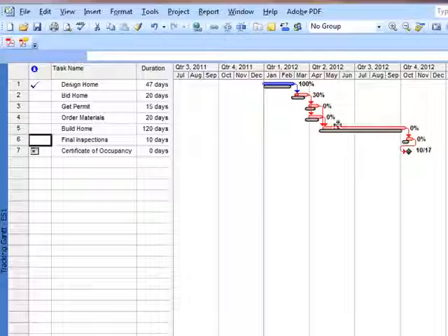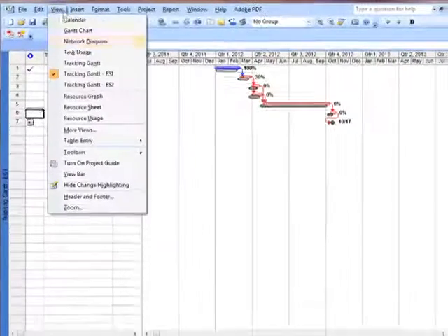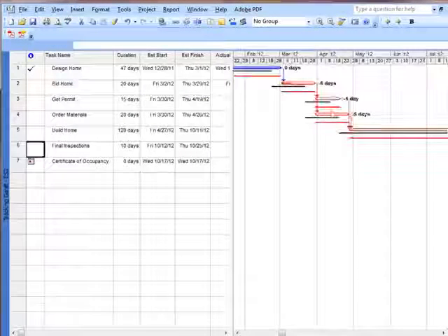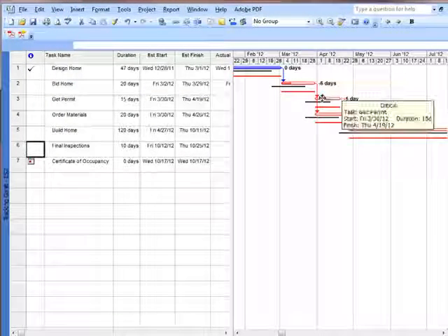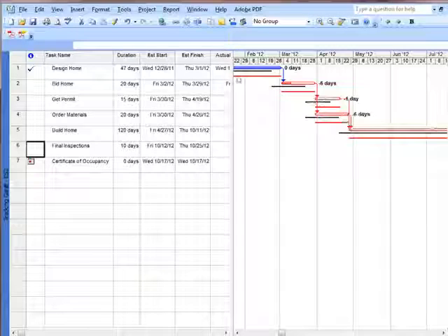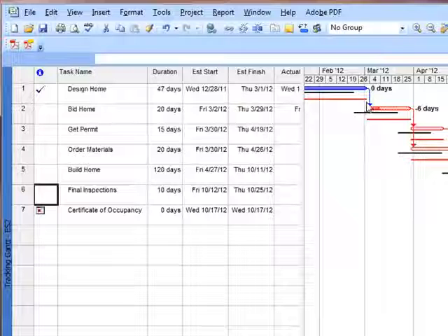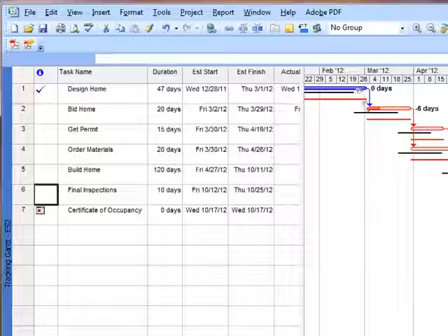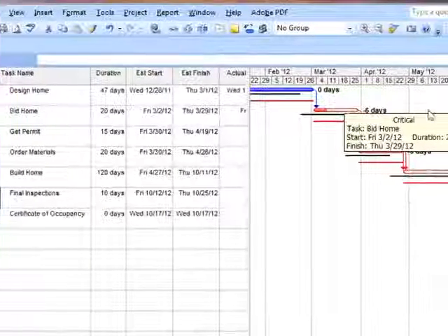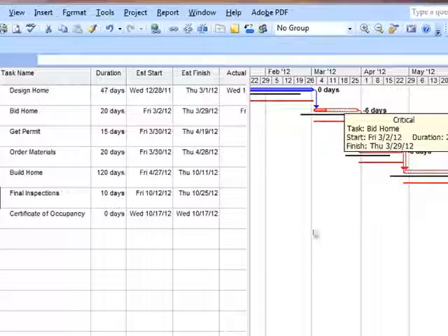I don't like that look at all. So we're going to go to View ES2, and that's what we get to see. If you want to go and update ES1, the only thing I would recommend is going to this format, but just copying ES2, making it ES1, and getting rid of the baseline 1, and you'll get a good idea from the beginning of the project to where you're at, so it doesn't get too crazy.